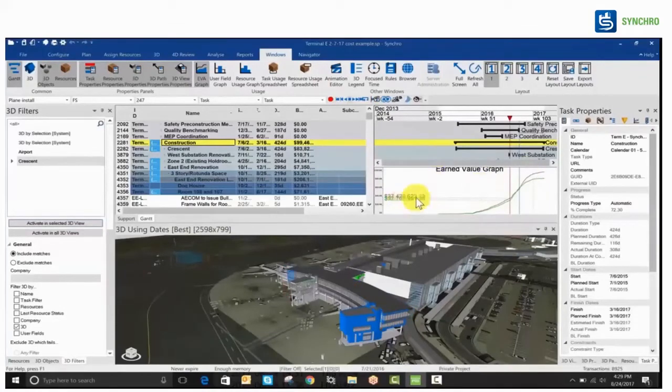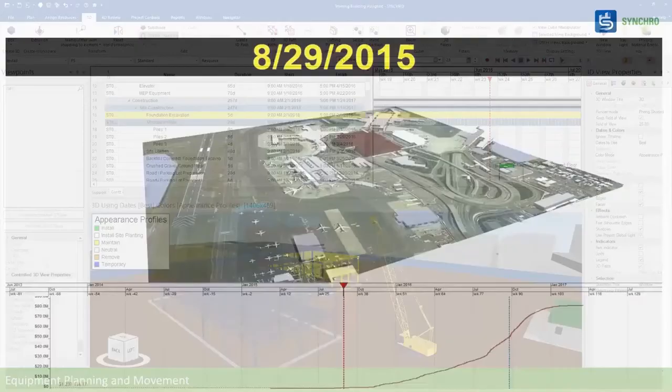You can attach the earned value graph to the task properties, where you understand what the cost of that is. Also, you can create as many baselines as you want for this graph, create the baseline cost, assign it, and compare that to the earned value cost also.